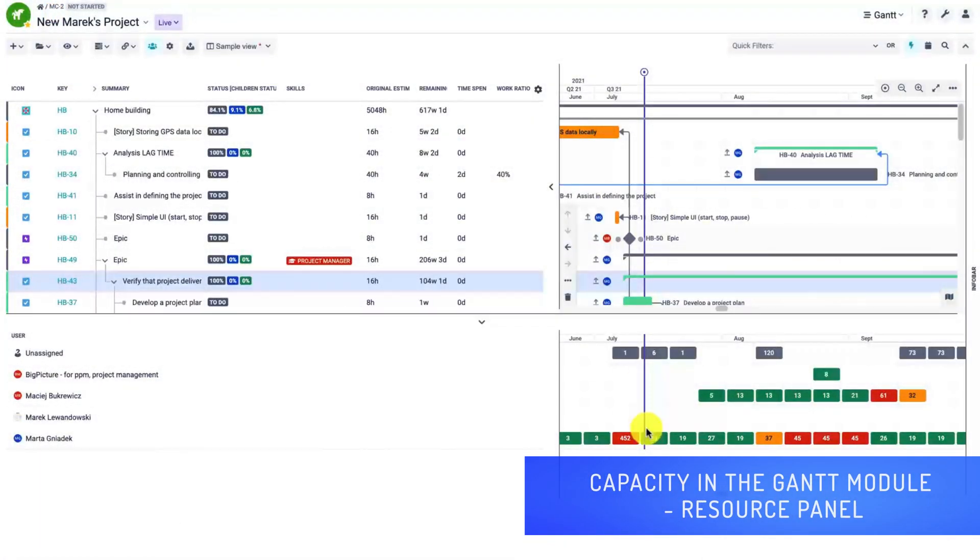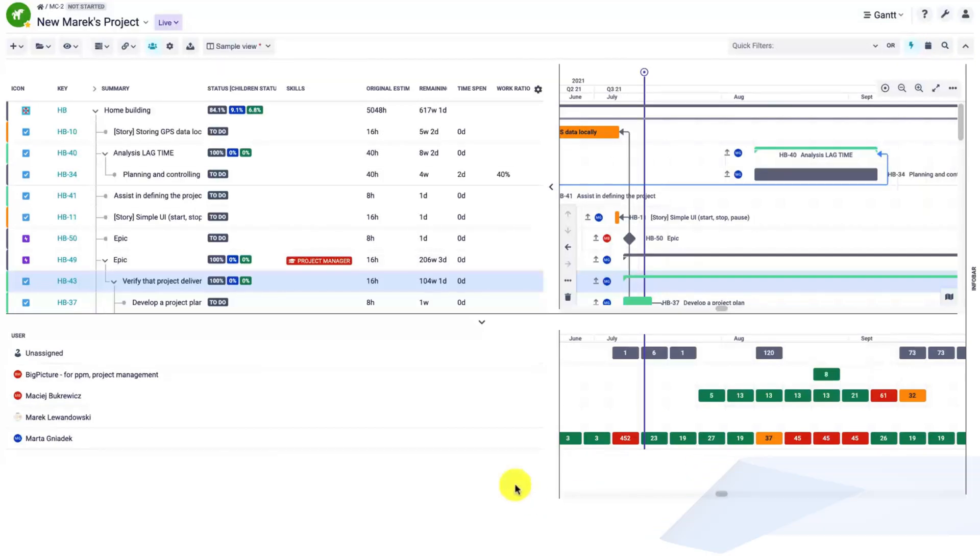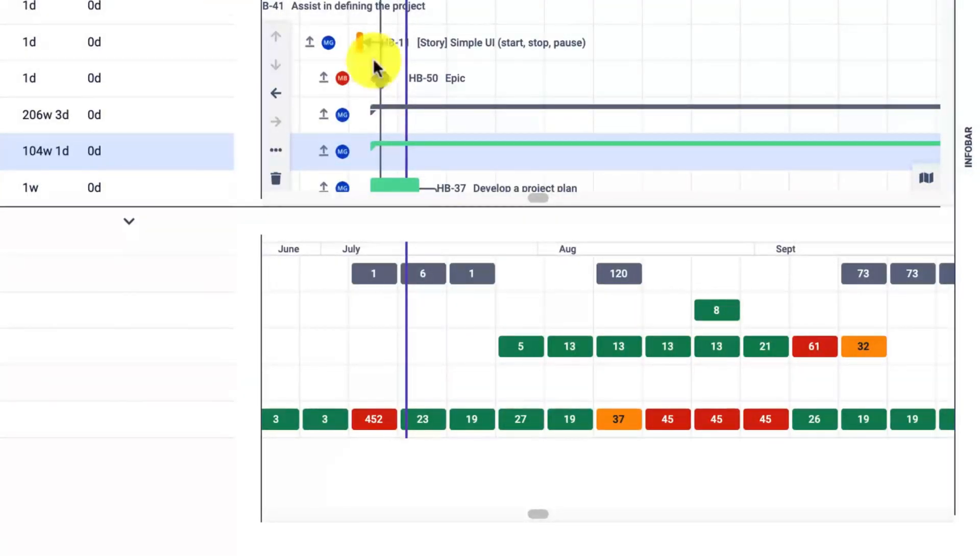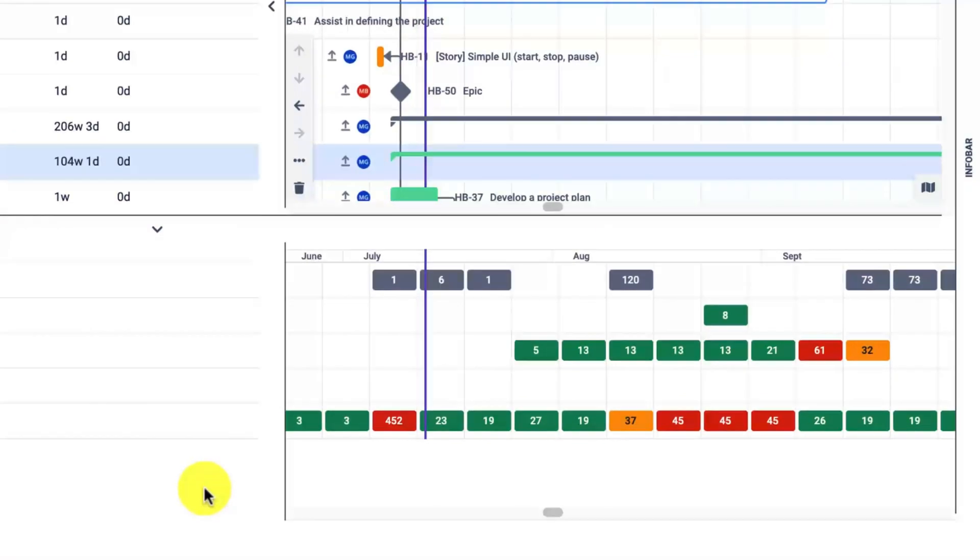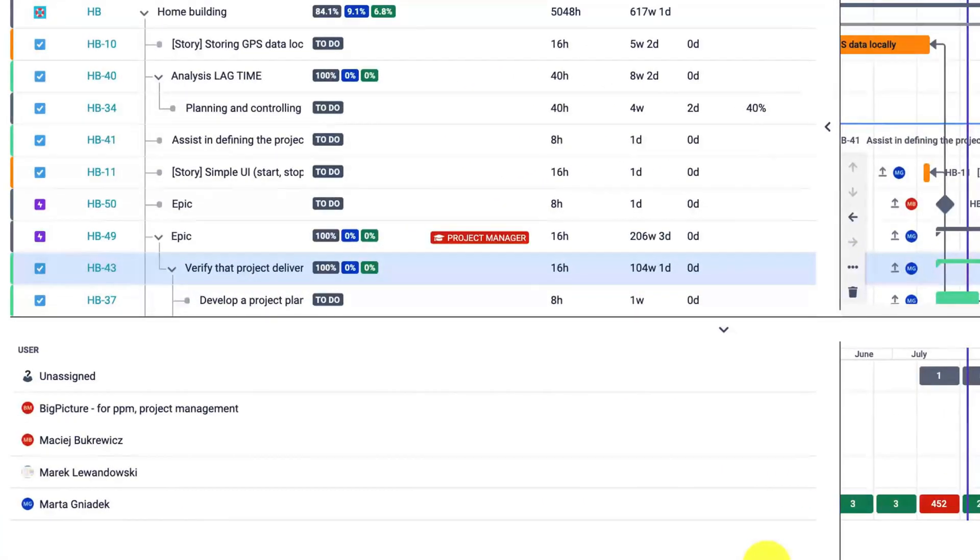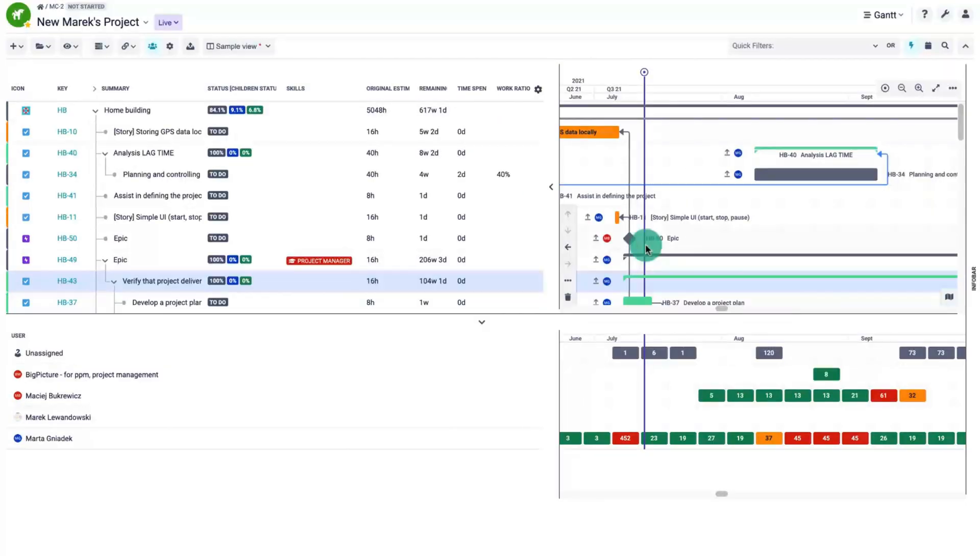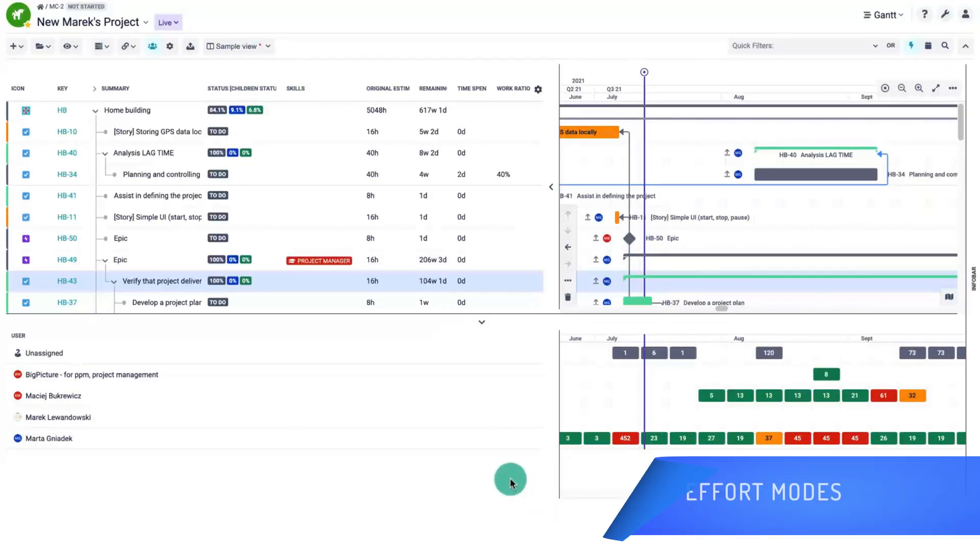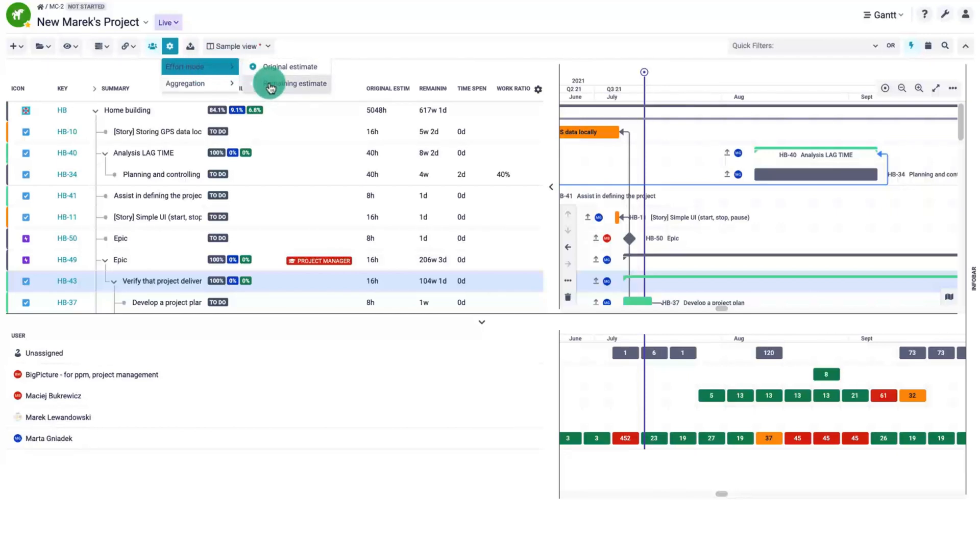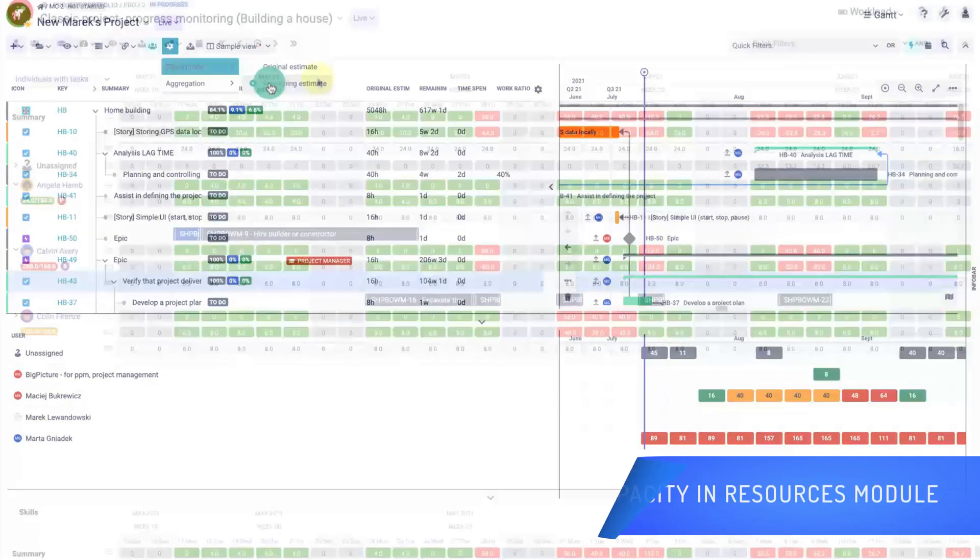The calculated capacity is displayed in Gantt, resources, and board modules. The Gantt module shows the capacity indirectly using color coding, with red meaning over allocation. The numbers indicate the sum of all efforts that have been assigned to a specific user or have been left unassigned. You can express the effort using the original estimate or remaining estimate and time spent. The Gantt shows time units only.